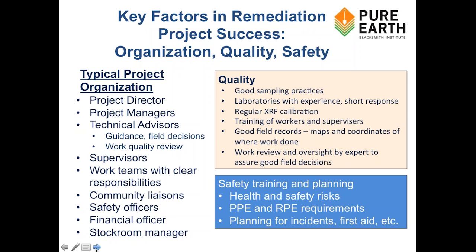You need a stockroom manager. It's amazing in implementing these projects that I've seen supplies walk away. It's amazing how supplies grow legs and disappear. You need somebody to manage the supplies and stockroom, because they will. You also need a full-time safety officer. In a lot of the countries that we work in, they're not used to using good personal protection equipment and respiratory protection, and you need somebody to enforce the rules, frankly, to make sure that you are protecting people.